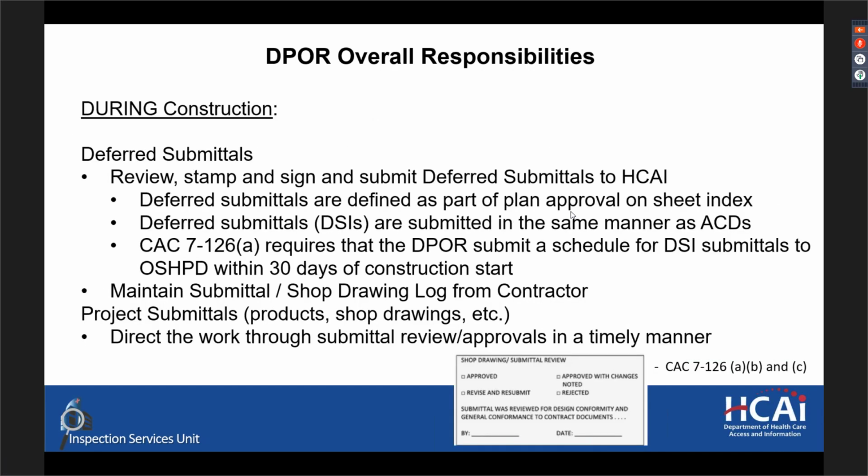So during construction, DPOR responsibilities are also tied to deferred submittals. The DPOR is required to review, stamp, and sign and submit deferred submittals to HCI. These submittals are all defined as part of plan approval, typically on the first sheet of any project under the deferred submittals section. Deferred submittals are submitted in the same manner as ACDs, meaning through the electronic plan review portal.